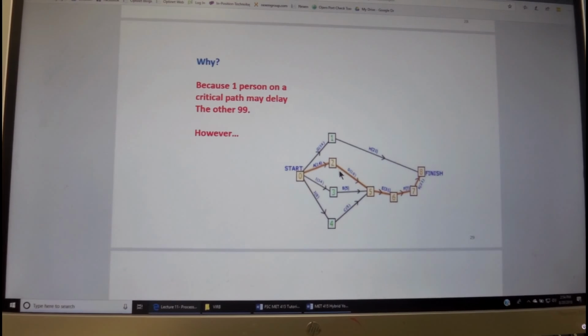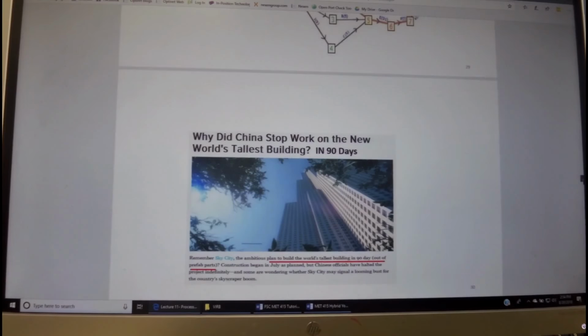And there is a critical path which takes the longest. And we see that if we add more people, they will not be able to do much unless the folks assigned to this path complete it. Because in order to go into this action item, all of these 3 must be completed. So if this is the one being delayed, they will be sitting idle and twiddling their thumbs.